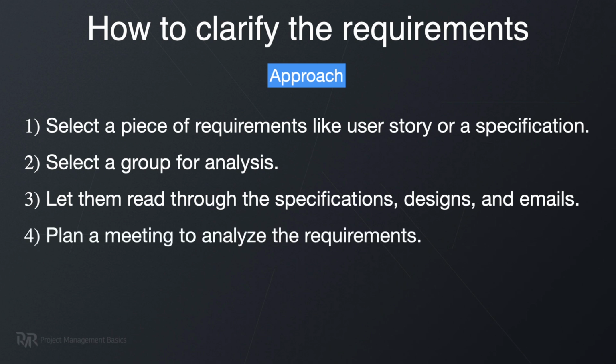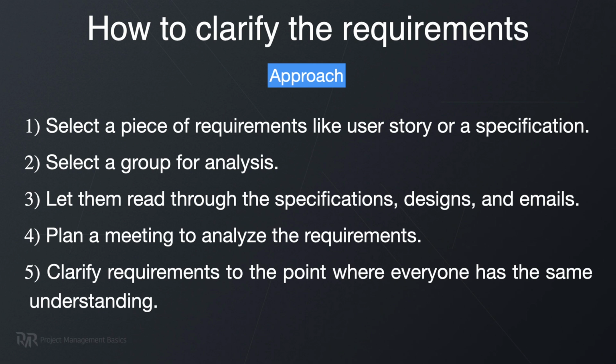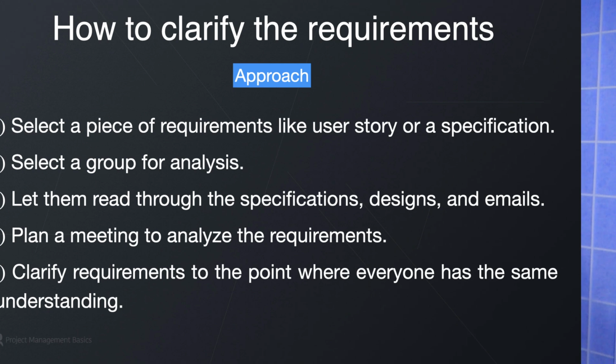After that, plan a meeting to analyze requirements. Let one person explain the requirements to the others and clarify requirements to the point where everyone has the same understanding. If you have never done this before, try it at least once, even if just out of curiosity. You will notice that different people read the same words and sentences differently.